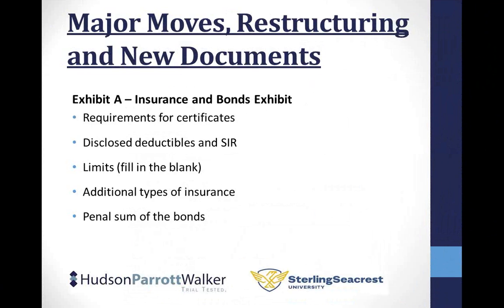In the exhibit itself, the deductibles are disclosed, so that's a good thing too, because we found that in a lot of situations people default to the GC or the owner to buy the builder's risk, and they're not even aware of what the deductible is because the contract doesn't say anything. In those cases, if you don't ask for the dec pages and a copy of the policy, you could be sorely surprised when the claim comes and you realize that the buyer of the policy specified $150,000 deductibles, which I had recently happen after doing a class like this. Literally the following week, somebody sent me a builder's risk policy and said, "Hey, take a look at this with Scott Griffin," and the deductible was huge, and they were able to get with the owner and negotiate that. So this contract, if they're using this exhibit appropriately, should give you some disclosure on that.